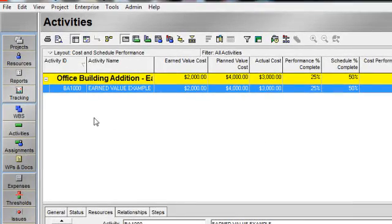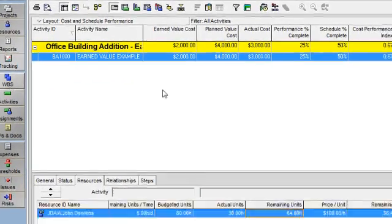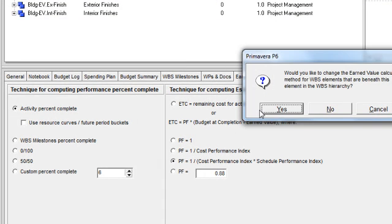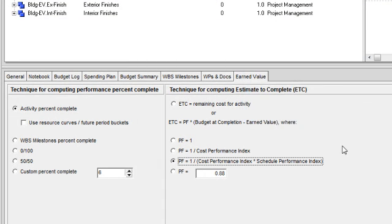Let's go back to our WBS and let's select the option where I'm using both CPI and SPI in the calculation of ETC.